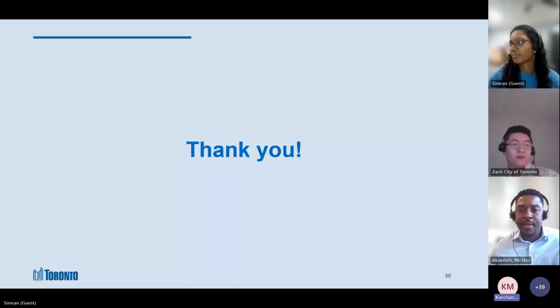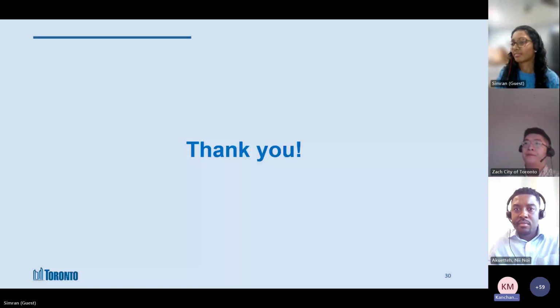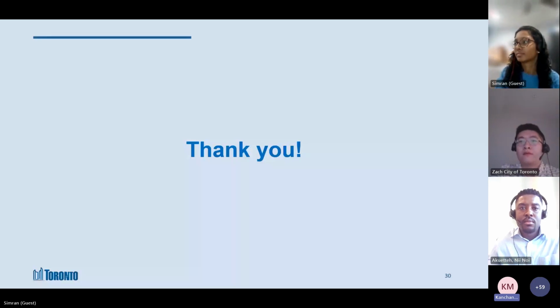Hi there. Simran and Zach were generous to help do this presentation because I wasn't able to, so I greatly appreciate that. I can answer more of the technical detailed questions as well. I can go back to Colin's question about the challenges for multiple contractors. Currently we have 3 different contracts, but luckily they're all the same contractor at the current moment. But myself and the team that I manage are our own general contractor, and we do the coordination on our side, where we make sure that we sequence them. Like the pavement marking happens first, the signage happens in coordination with the pavement marking, and then the separators go afterwards, and then the Ziklas come last. So we do all that coordination ourselves. Right. Okay.